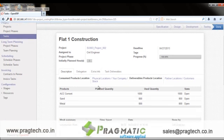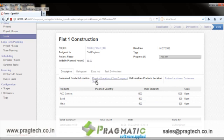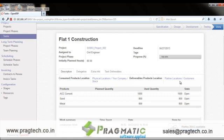There may be scenarios where the user needs to consume products while executing a task. The user can list all products with their planned quantities, and actual used quantities can be updated at the time of work done. To consume stock, the user can define a specific location, since in the construction industry there are often multiple site warehouses for different projects. Stock gets depleted once the task is done and the finished product is delivered to the deliverable product location.